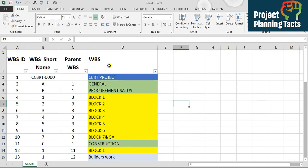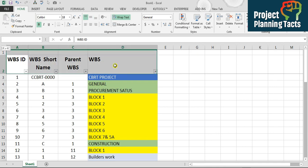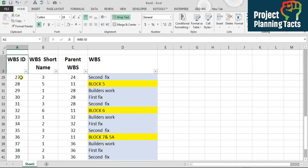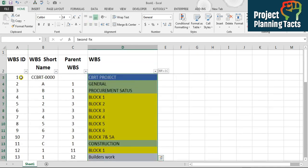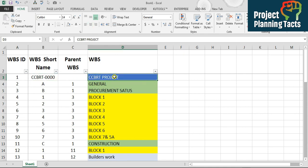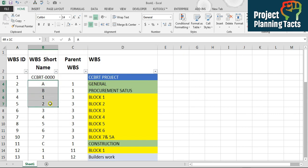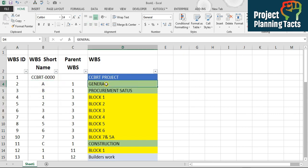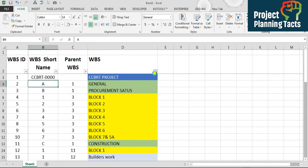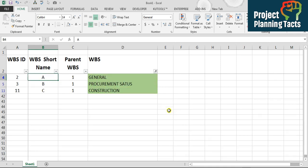Today I'm going to show you how to create WBS from Excel to Primavera — it is very quick and very easy. If you look here, I have an Excel sheet with a table which has a WBS ID — a sequence number from 1 to 39, so the total is 39. Then I have the WBS short name, the project ID and the project name. The WBS short names are based on colors: green defines WBS level 1, yellow defines WBS level 2, and gray defines WBS level 3.